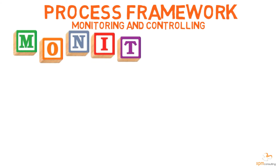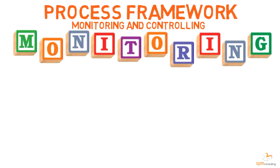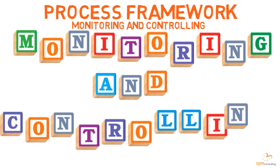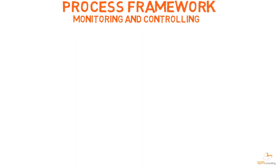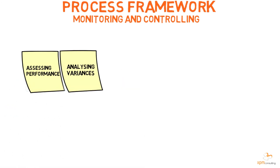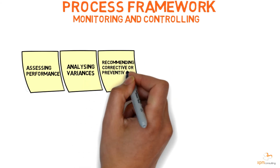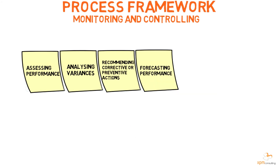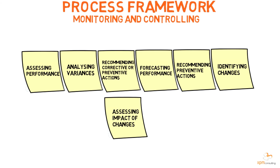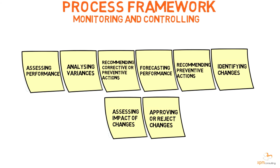The Monitoring and Controlling Process Group includes all the processes required to align actual performance with planned performance, and to align the plan with value. Examples of monitoring and controlling activities include: assessing actual project performance, analyzing variances, recommending corrective or preventive actions, forecasting performance, recommending preventive actions when a potential variance is forecasted, identifying changes, assessing the impact of changes, and approving or rejecting changes. These key activities are used across the project knowledge areas with slight adaptations of terminology.